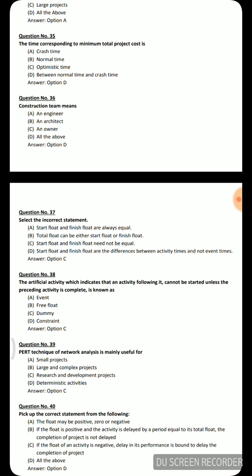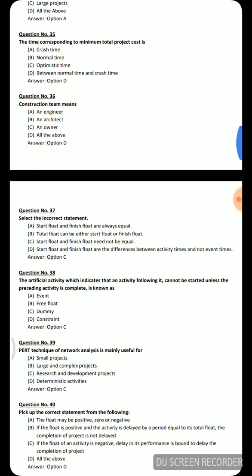Next question: The artificial activity which indicates that an activity following it cannot be started unless the preceding activity is complete — used in the drawing of a network — is known as a dummy activity.